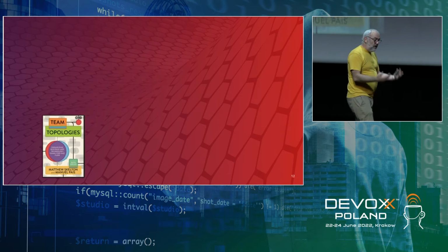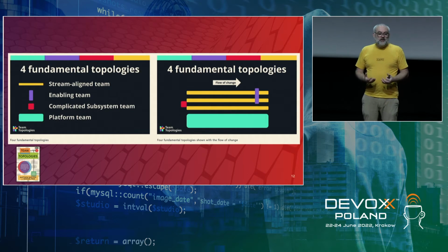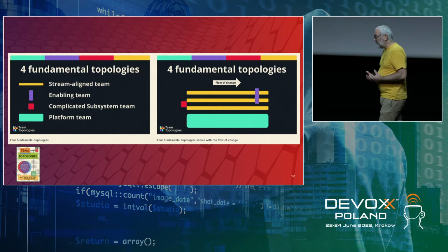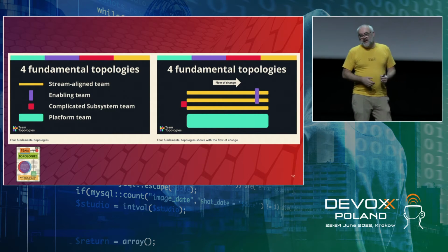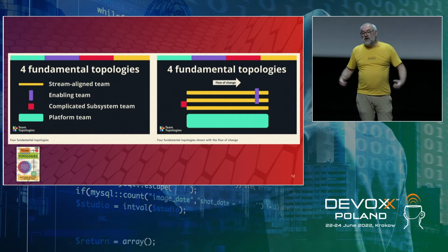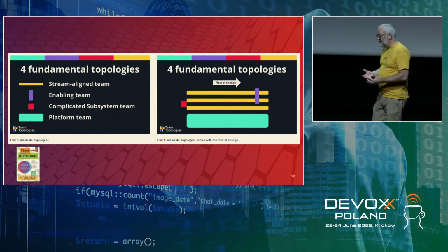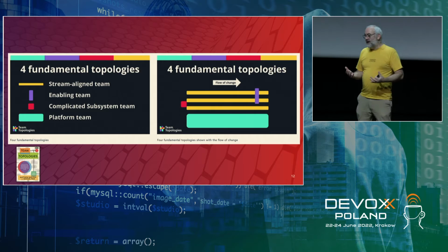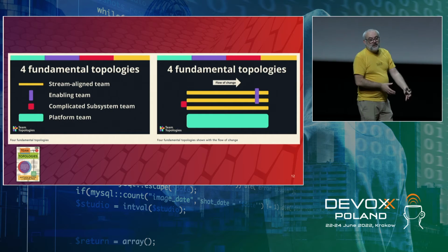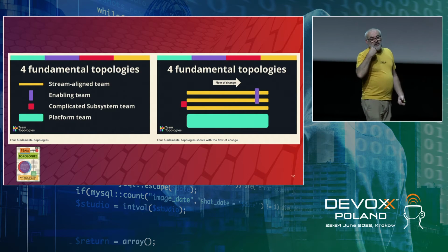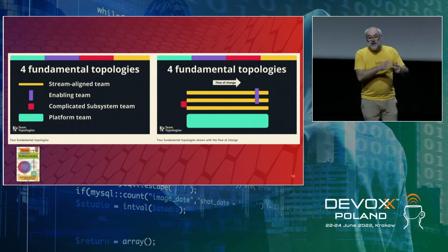So what Team Topologies does as part of its model is give us these 4 different types of team structure that we can use to optimize and organize ourselves. So the first one is this idea of a stream-aligned team. Now, I talked about value streams. You wouldn't have a value stream-aligned team for that whole value stream. What they're talking about here is things like your typical sort of product teams. They call them value stream-aligned teams. So if you've got maybe an e-commerce site, that you're a retailer, you might have a stream-aligned team around your basket. You might have another one around search, another one around catalog, who are owning everything end to end, and who have, and this is the crucial bit, a direct line of sight to the customers of that part of the site, part of the software.